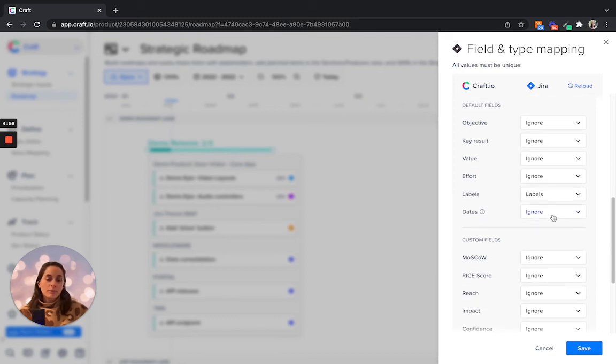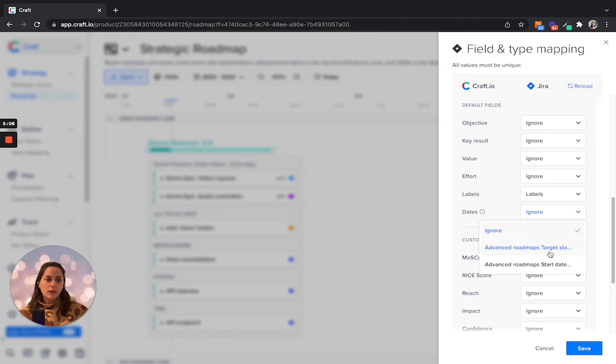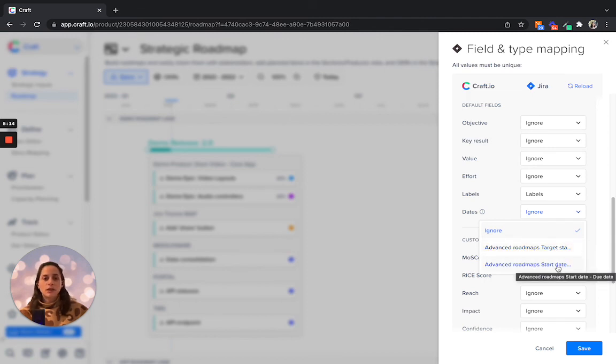In terms of dates, if you do want to map that, you can either map it to the advanced roadmaps target date and target start and target end dates, or to the start date and due dates.